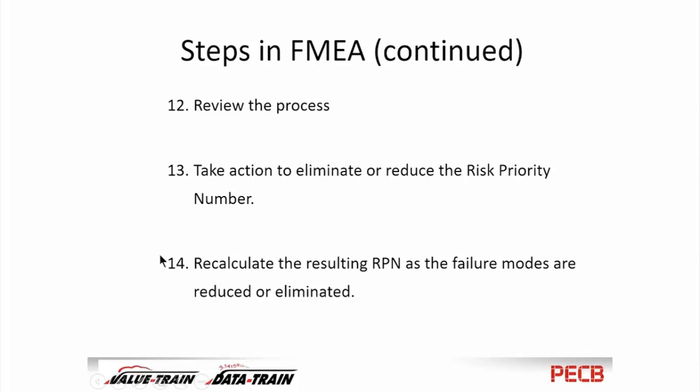Some companies use one team to determine the risk, and then once the problems have been addressed and worked on, they use a second team to assess the risk again, because it's very easy for a team to just assume that everything that we did worked and to plug in all the same numbers and come up with the same answers and make them all a little bit smaller perhaps, and make it look like everything always worked, and everything doesn't always work. So sometimes this is done with two different teams.